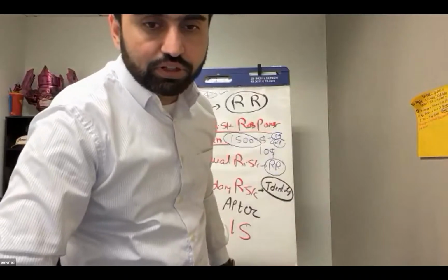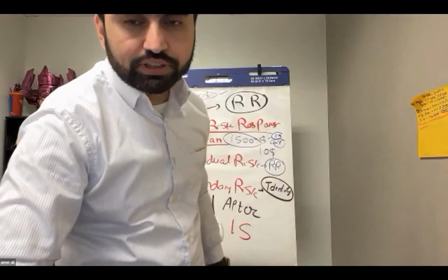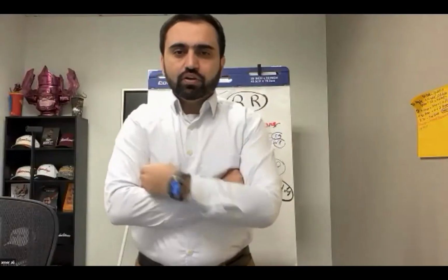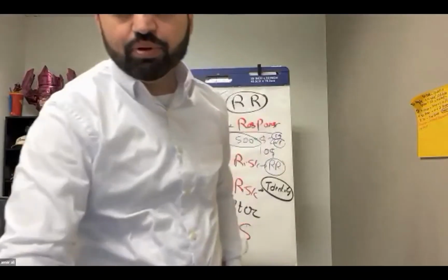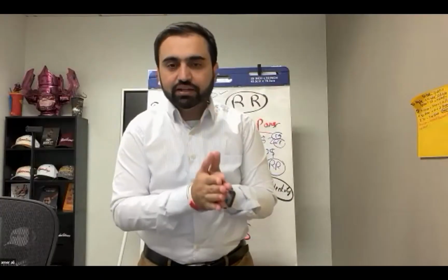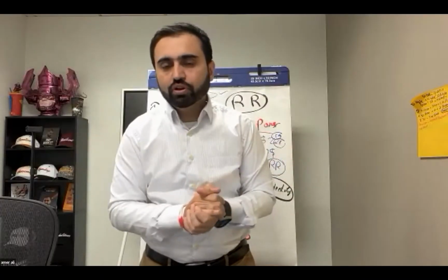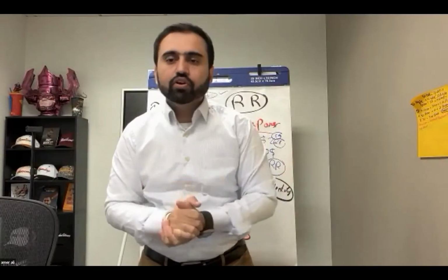Okay. So I have a question. Can you send the question in the chat? Martina, just send the question in the chat. If without plan, any problem comes. Yeah, Osman, that is the summary of the entire thing. If anything comes without a plan, we go for the issue log. If things come according to a plan, we go to the risk register. Martina, go to the next question and you can share it.